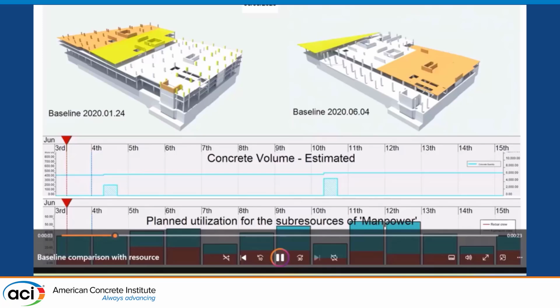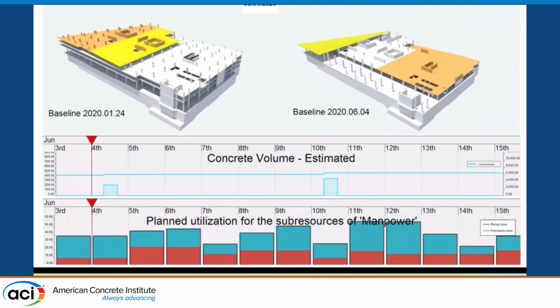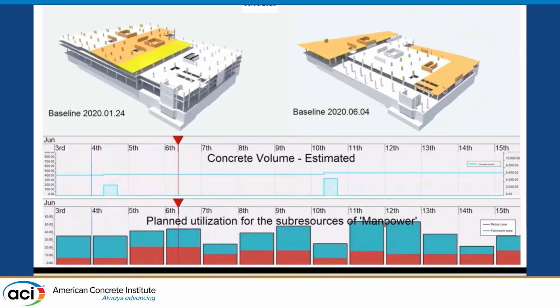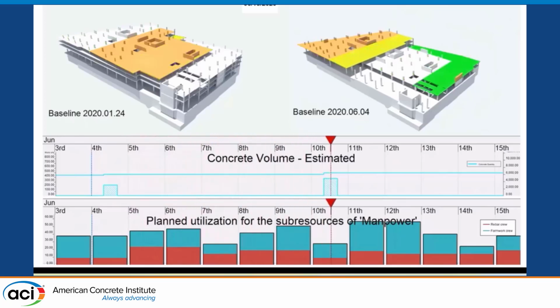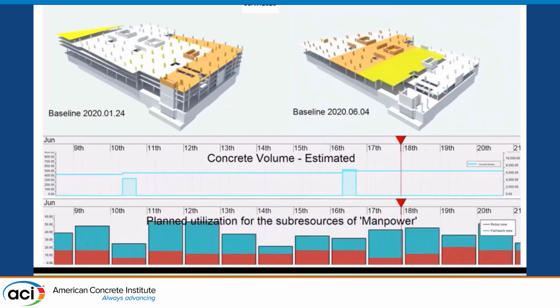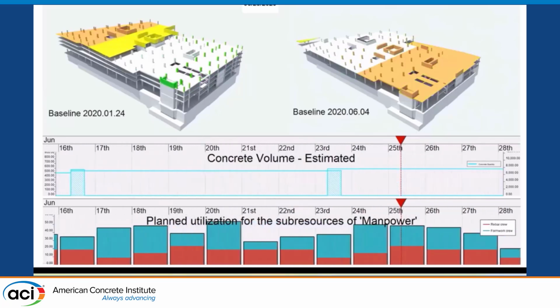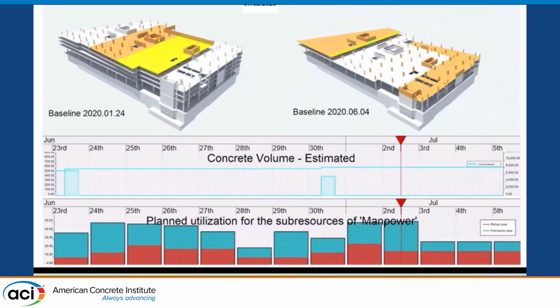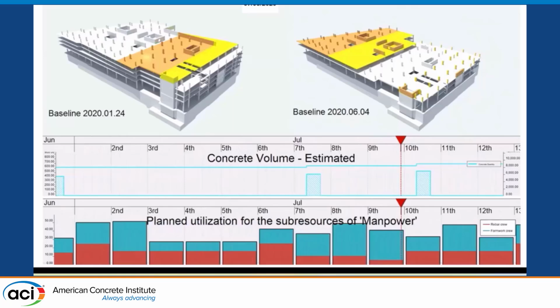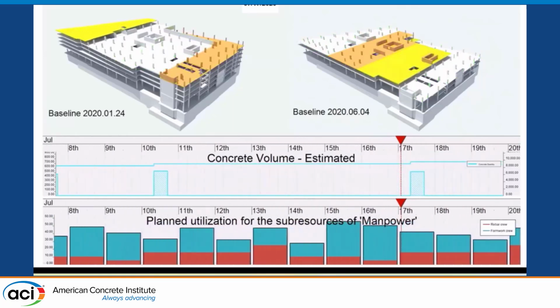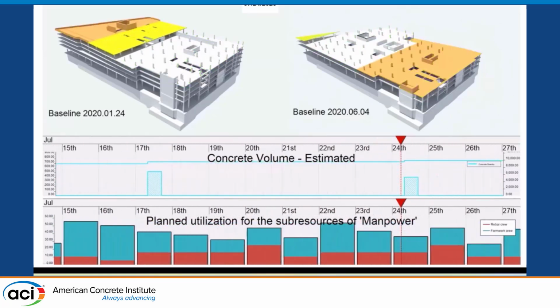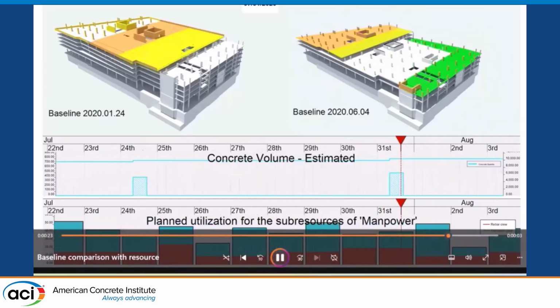And also, any data in your schedule can be loaded. By using this, you can show your quantity projection from the model, or if you load your resource and manpower, all those data can be visualized with the 4D sequencing. This is better for communication that way.